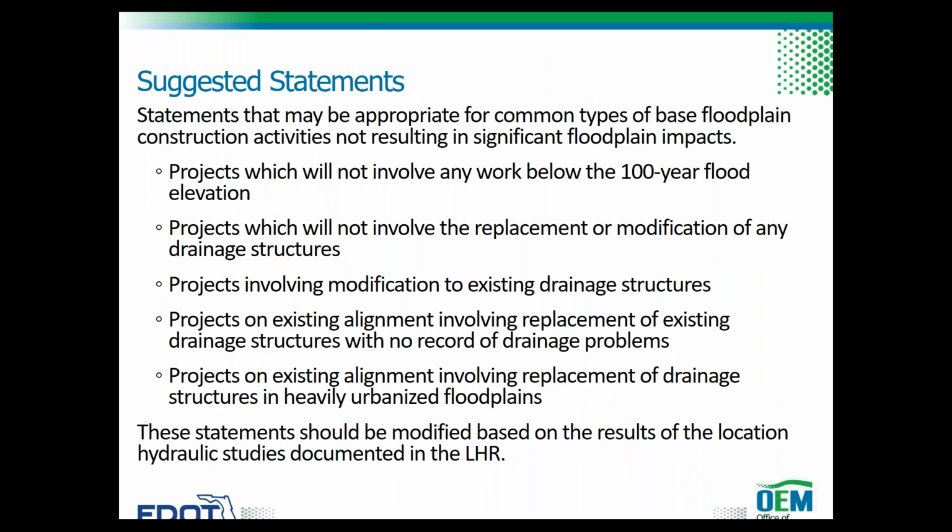FDOT has developed statements that may be appropriate for common types of base floodplain construction activities not resulting in significant floodplain impacts. The chapter contains 6 statements that should be used for the following conditions: projects which will not involve any work below the 100-year flood elevation, projects which will not involve the replacement or modification of any drainage structures,